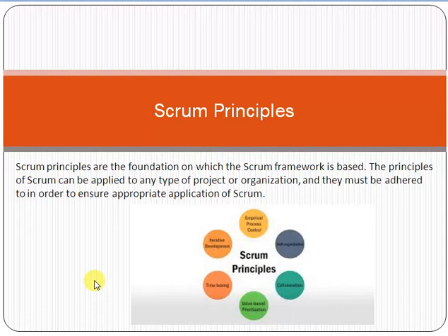For example, friend, if we have to implement an e-commerce solution for a customer and there are 40 tasks in a project, and we use the waterfall approach here, we plan, develop, test and deploy it at the customer side. We plan all the 40 tasks, then develop all the 40 tasks, then test all the 40 tasks and then deploy the whole complete 40 tasks for the customer.